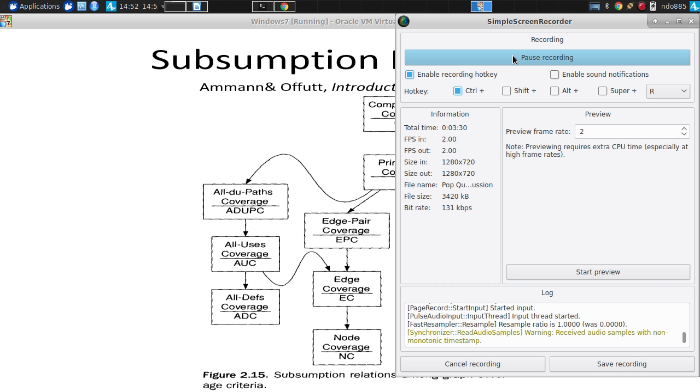What is risk exposure? I could have asked a question about that. What is risk exposure? It's going to be a figure of some sort of how many risks. Okay, at a broad level, that's pretty good. Really, though, it is defined by many as more precise than that. It's kind of the expected impact of that risk. So it takes into account the probability of the risk coming about, but also the level of impact if it does. And it's often treated as the product of those two. So if something is highly probable, even if it's only a modest risk, it may be a serious risk exposure. By contrast, if it's very low probability but devastating, it could also be a serious risk exposure. And if it's high on both, that's really bad. And a lot of things are low, in which case we don't tend to worry about them that much.